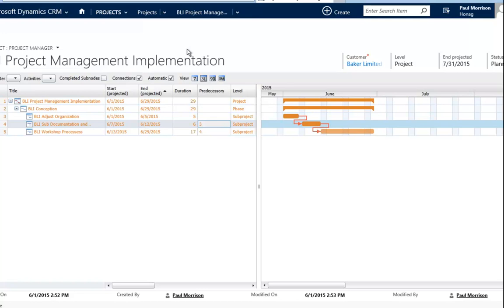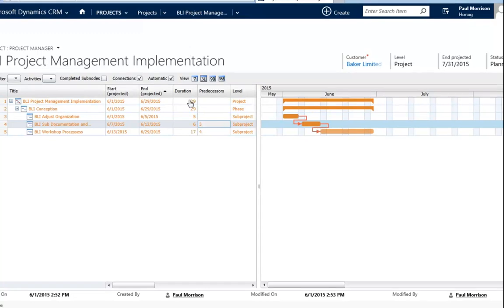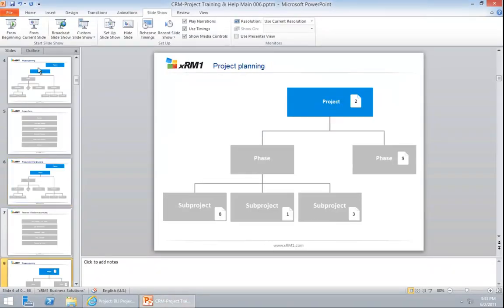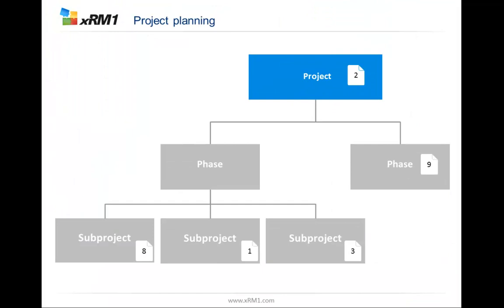When the project structure is done, the times are settled. We also have the possibility to plan work on our project. I have prepared my project. I have planned some work on my nodes. I said ok, the subnode takes 8 days, the other one 1 day. Or the project itself, like work that's not on the subnodes would take, the project management would take 2 days. I have this work budgeted for my project and need to put that in. But I also want to see not only what are the times on the project itself. I want to also see what is the plan for the work for the whole phase or for the whole project.